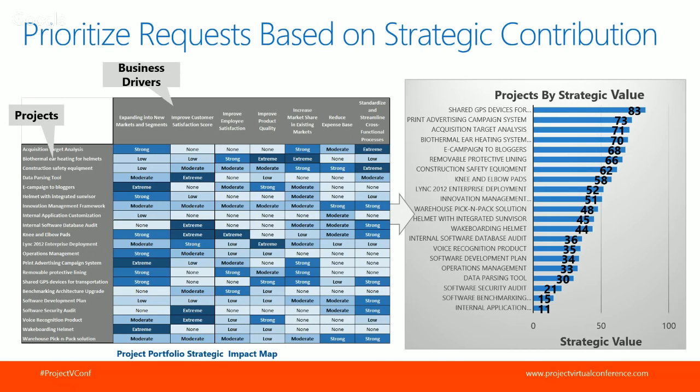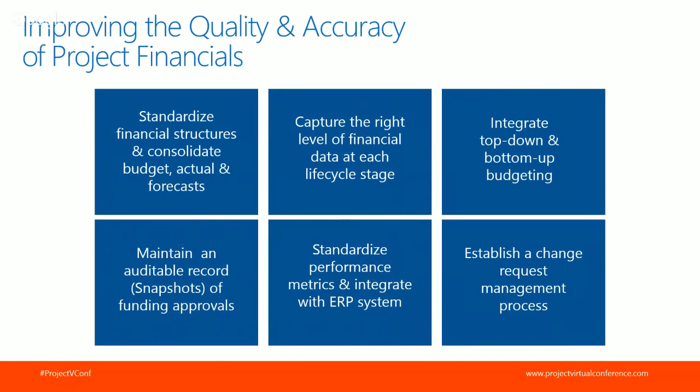And the important aspect here is, we look to derive an absolute strategic value score because we want to track that score through the life of the project. So again, to derive a good strategic value score, you really need to start off by defining a good set of business drivers and look at driving a good consensus around those priorities, and then develop those impact statements so you can quantify that strategic value score for each one of the competing investments.